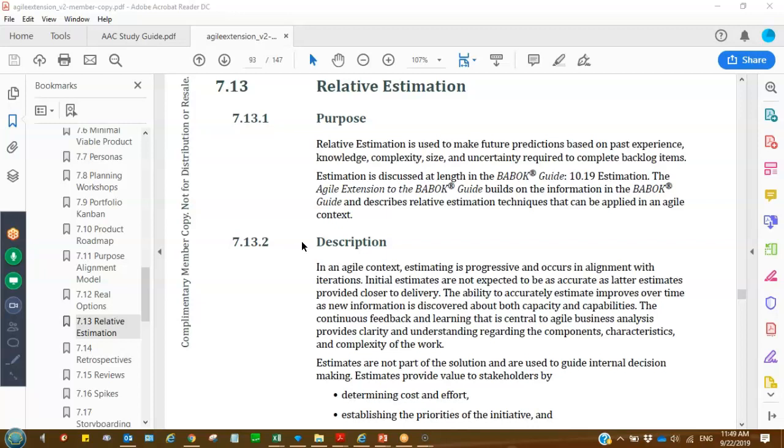But you don't assign a contingency to each particular item in the chain. You start by saying, this is what this will take to do. And then you have that little bucket at the end in case something happens. Different way of looking at things, and a way of trying to get people more towards reality.